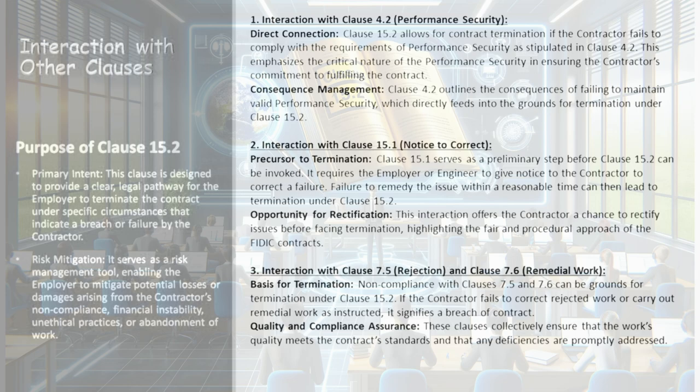Interaction with Clause 15.1 — Notice to Correct: Clause 15.1 acts as a preliminary measure before invoking Clause 15.2. It necessitates the issuance of a notice to correct a failure by the contractor, with the failure to remedy this leading to potential termination under Clause 15.2. This interplay provides the contractor with an opportunity to resolve issues prior to facing termination, showcasing the fair and procedural nature of FIDIC contracts.